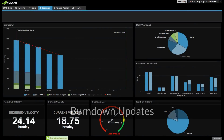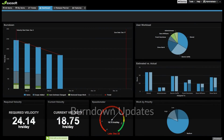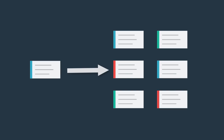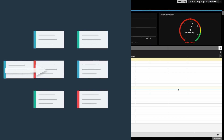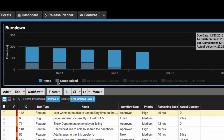We have updated your burndown chart to accommodate scope change in a few major ways. First, if you add work to an existing sprint or release, that work will be added not only to today's burndown bar, but as a series to all the days prior.